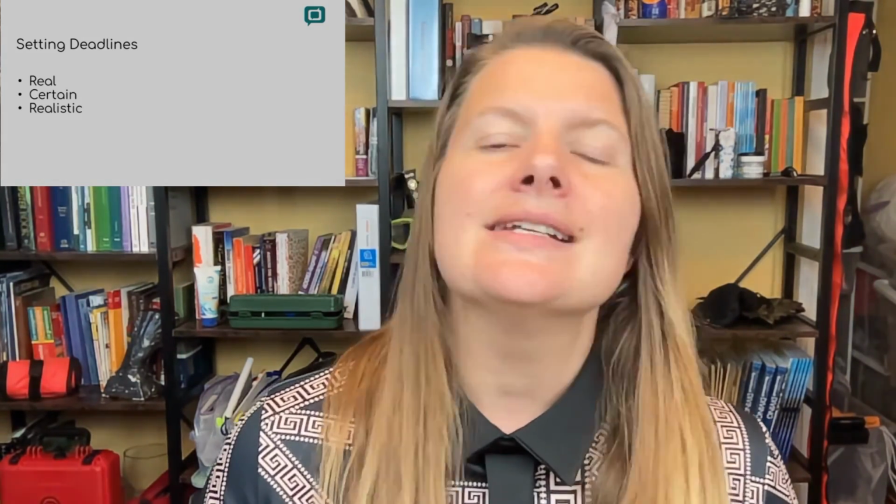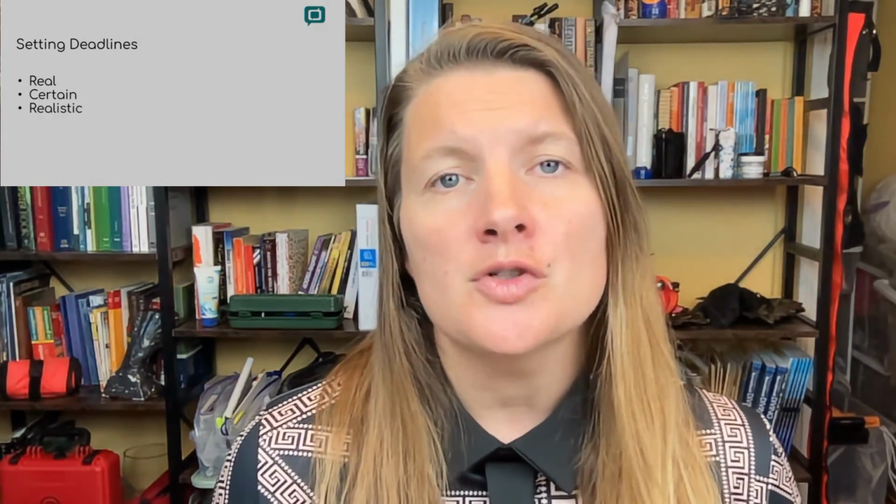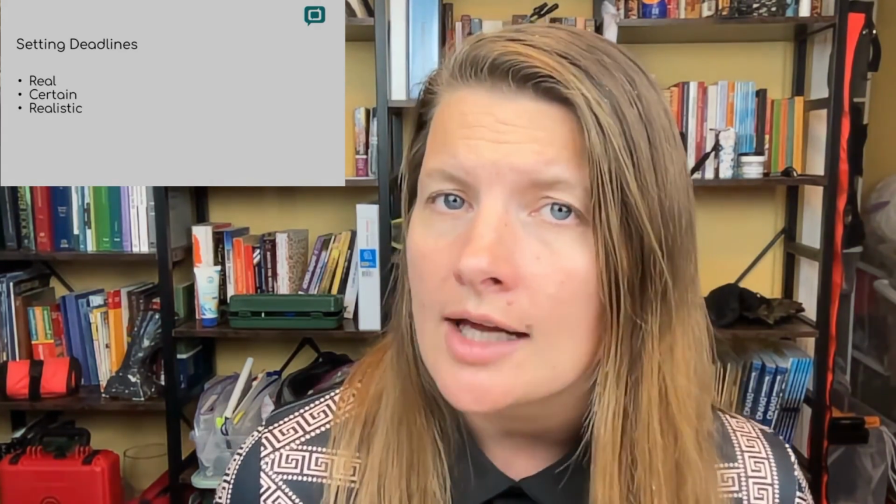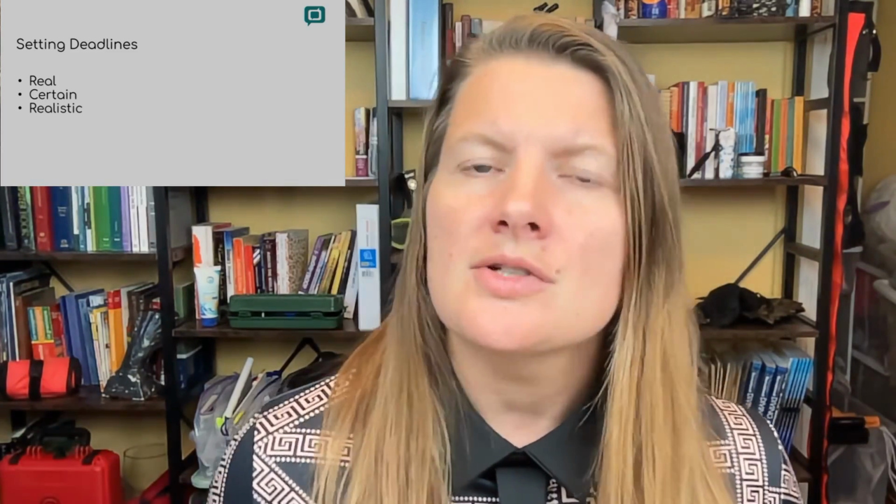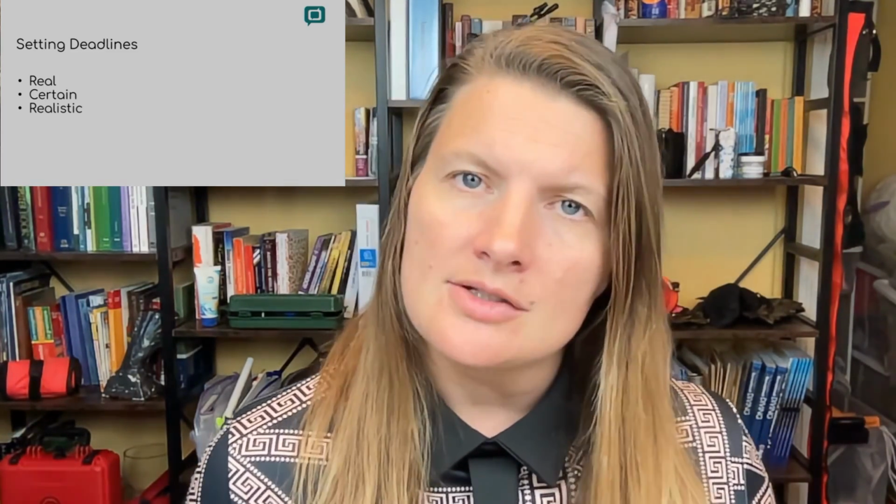And that it is unrealistic for folks who either have not done this ever or have not done it in a long time to tell them, well, I think a motion only takes 2 days. Well, that's nice. So write it yourself. But if the person that you're assigning it to tells you, well, I need 4, then that person needs to have 4 days, because then that is a realistic deadline and it is real and it is something that they can abide by.